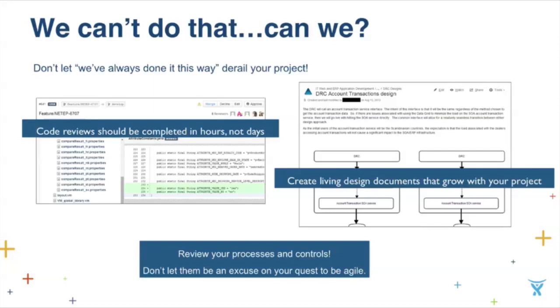Right, design documents. A lot of people think you don't design in Scrum, but you do. When we're initializing a project, we'll sit down, we'll do a basic architectural diagram: what are the major pieces of the project, and what are some of the interaction points. Then we design as we go. So when we're getting ready to implement a feature, we'll probably have a spike 1 or 2 sprints ahead of time, and we'll design that feature out. And we'll document it in Confluence, which gives us a living design document.